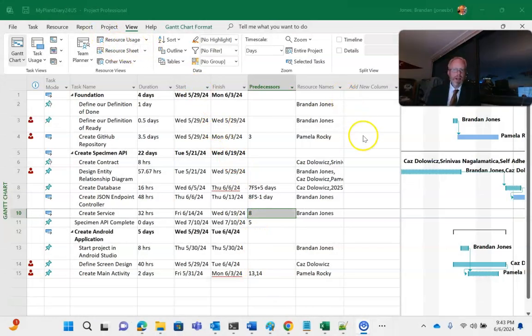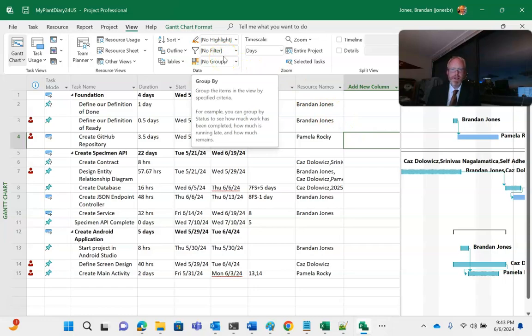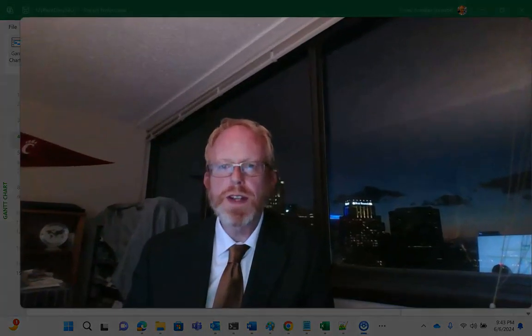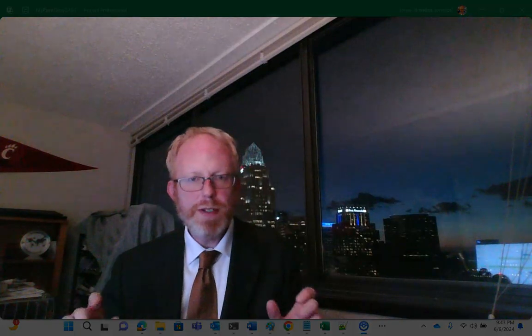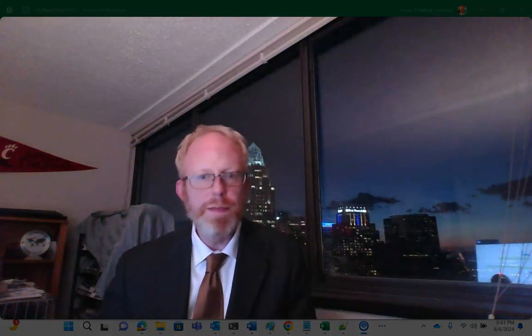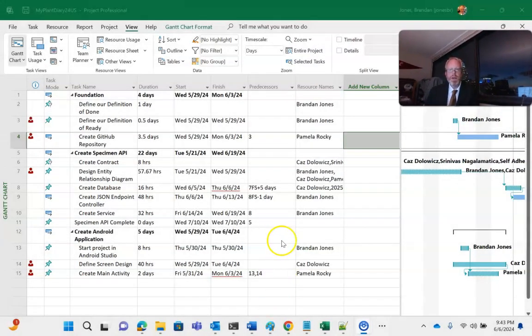Now, I already have this project, and I have set a baseline on the project earlier. The baseline effectively says, at this point in time, this is what we believe the schedule and the budget to be. You need to set the baseline, and then as you adjust the schedule and budget, it will compute a lot of these metrics for us.